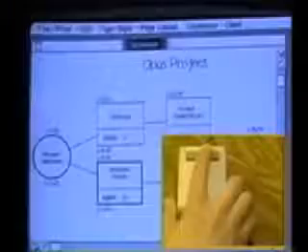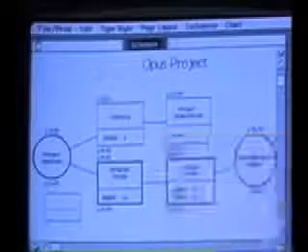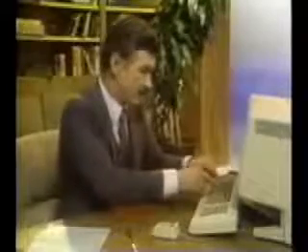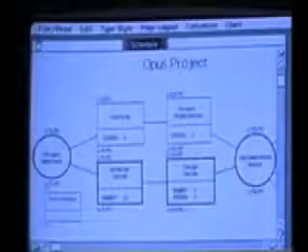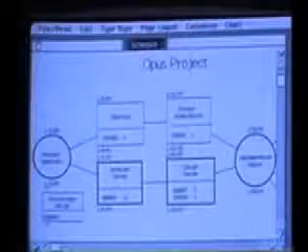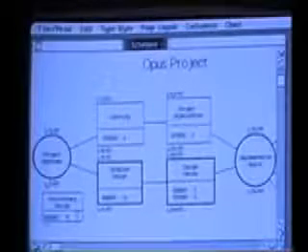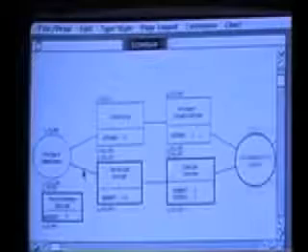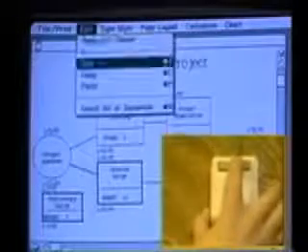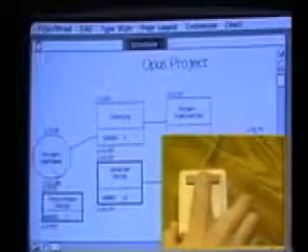This one is the latest I must start a task if it's to be completed on time, and this one is the latest I have to complete the task if I'm not to delay the whole project. With Lisa, I can update the structure of my chart using just the mouse. To add a task to my flowchart, I draw this box with the mouse and enter the name of the new task from the keyboard. I can delete this old line using the mouse and draw in these new lines.